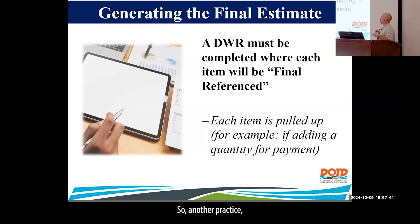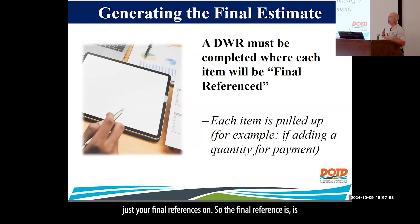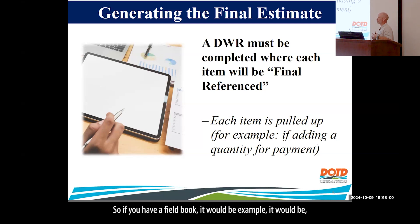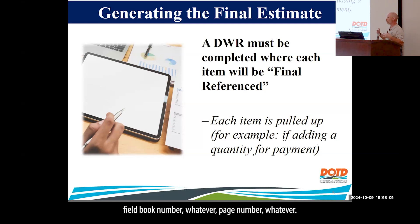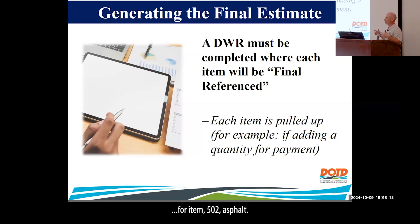Another practice: a final DWR should be done once you're ready to submit your project, with just your final references on it. A final reference is where your totals are for the items that you're paying. For example, if you have a field book, it would be field book number whatever, page number whatever — that's the total for item 502 asphalt.